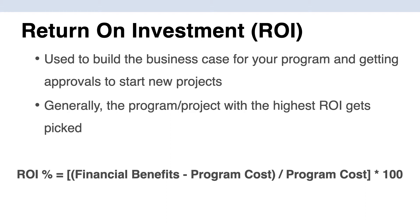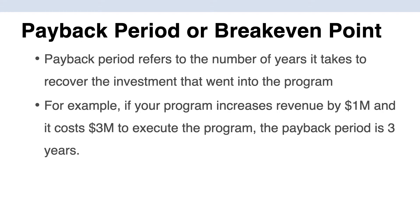Starting with the first one: Return on Investment. ROI is used to build the business case for whether or not it makes sense to start your program. Generally this is done at the start of the program, and the company will pick the program or project that gives them the highest ROI. You calculate ROI as a percentage: financial benefits received from executing the project or program, minus the cost, divided by the cost, then multiply by 100 to turn it into a percentage.